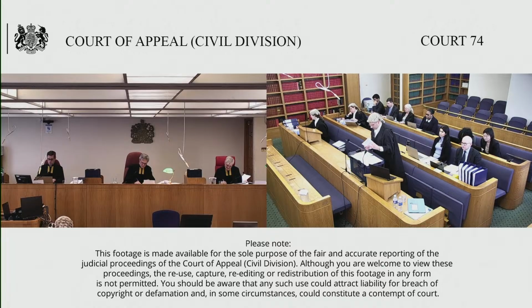And likewise with the geophysical and geotechnical, and I should just note before we leave that, on internal page 53 at 196, there is a specific factual finding by the FTT who considered all of this evidence that without those studies, the specific design of the wind turbines could not be undertaken, and so they could not have been fabricated.